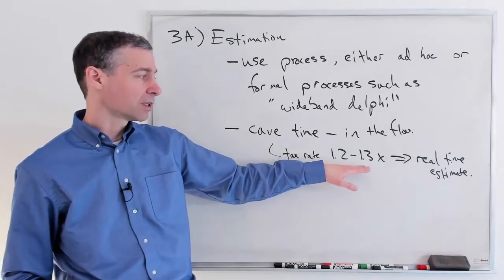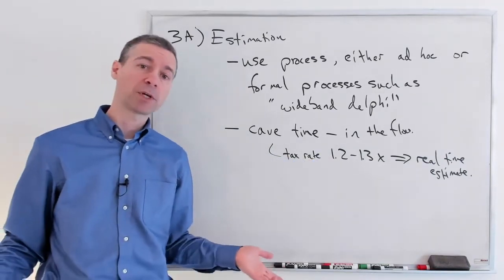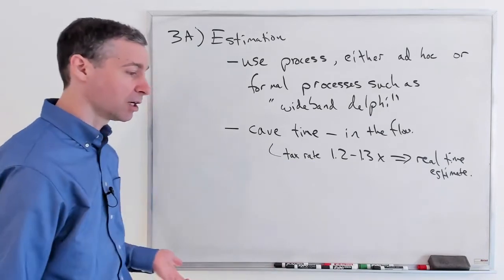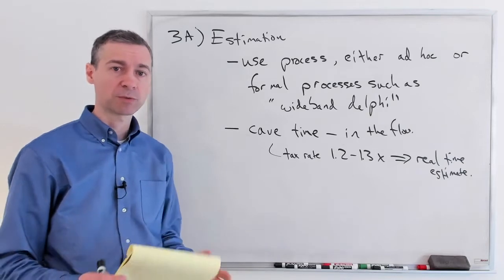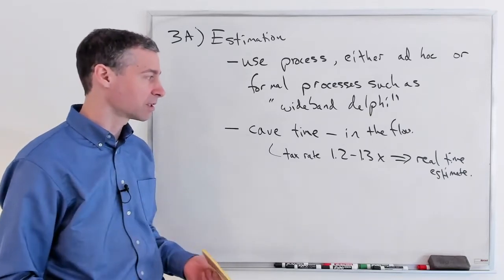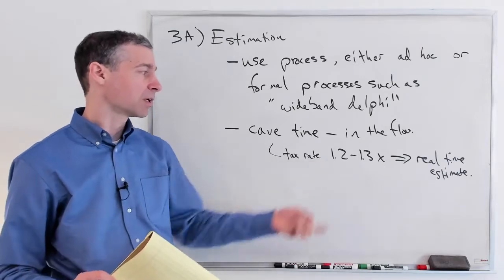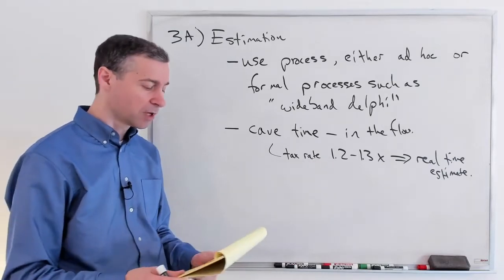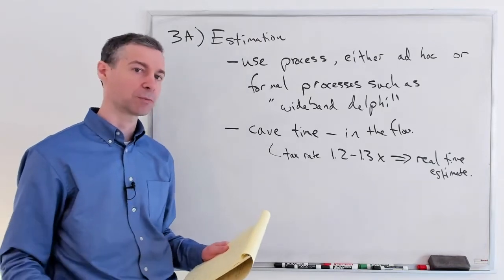I often found that a 20 to 30% tax wasn't applicable. I needed about a 300% times tax. I was absolutely horrible at estimating in time. It usually took me 3 times longer to get things done than I thought it would take me. So over time, I learned to be better at estimating through actually tracking my actual time and comparing it to what was being done.